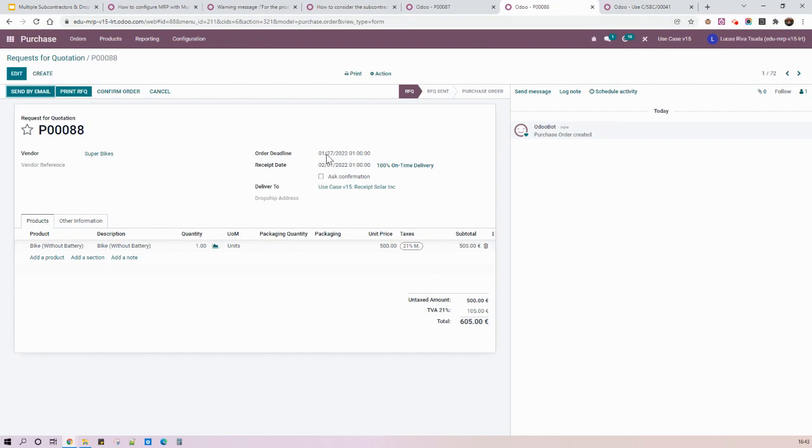I must confirm today, so Superbikes will have enough time to do the subcontracting order and deliver to Solar Inc. exactly on the same day Solar Inc. will start the production of my finished product. So this is very important.